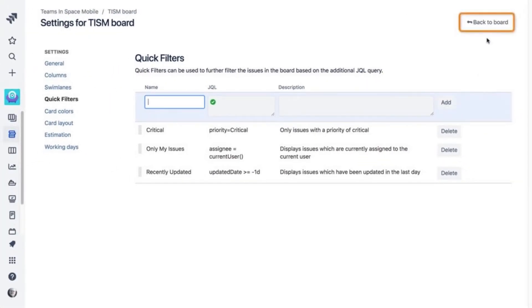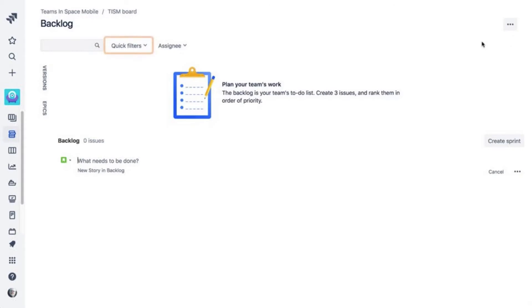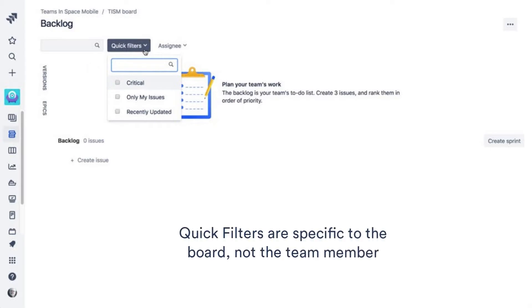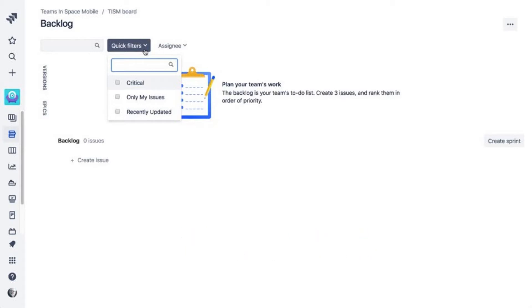And click Add to create your filter. Now, you can view all critical issues and your teammates have access to this filter as well. Remember, quick filters are specific to the board, not to the team member. So all of your teammates will be able to use the quick filters.